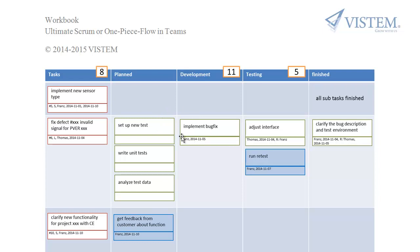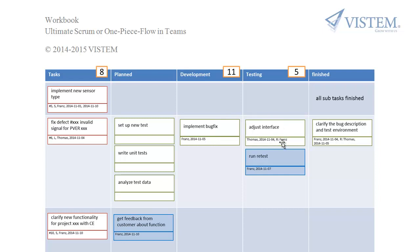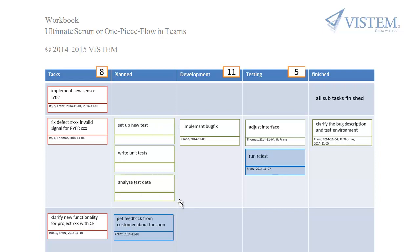Each time one person can start a subtask, he takes one, puts a name on and the start date. Then it goes to testing or review. The reviewer is marked on. If the review fails it goes back, if it's fixed it goes further. In the case it's finished it goes to finished and gets the end date. In case it is blocked, the team sits together, makes a root cause analysis, and adds some subtasks to fix the problem.